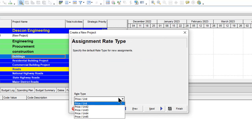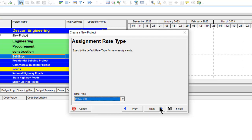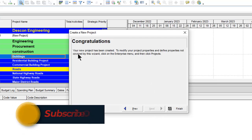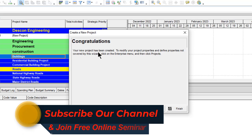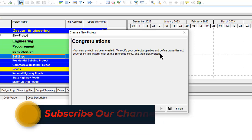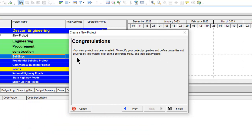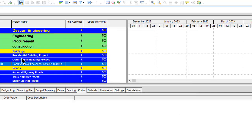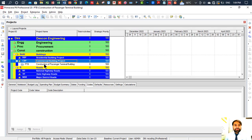The rate type should be 'Price Per Unit.' Click Next. Congratulations — your new project has been created! To modify project properties not covered by this wizard, click on the Enterprise menu and then click Projects. Click Finish — your file is now created.